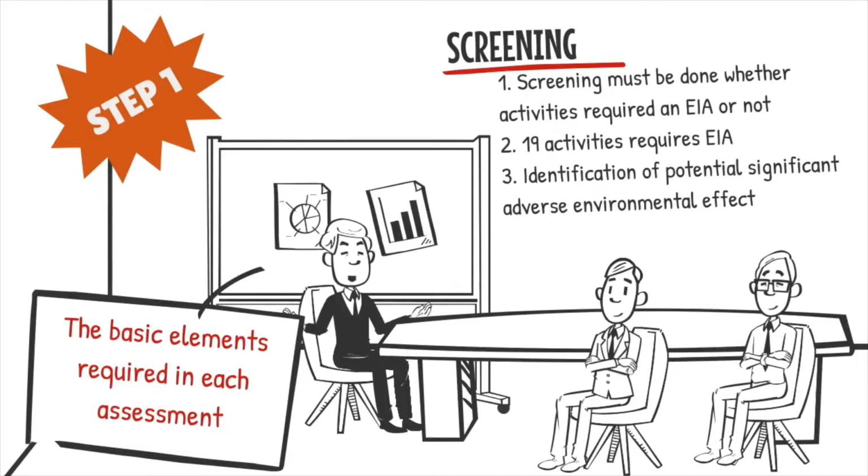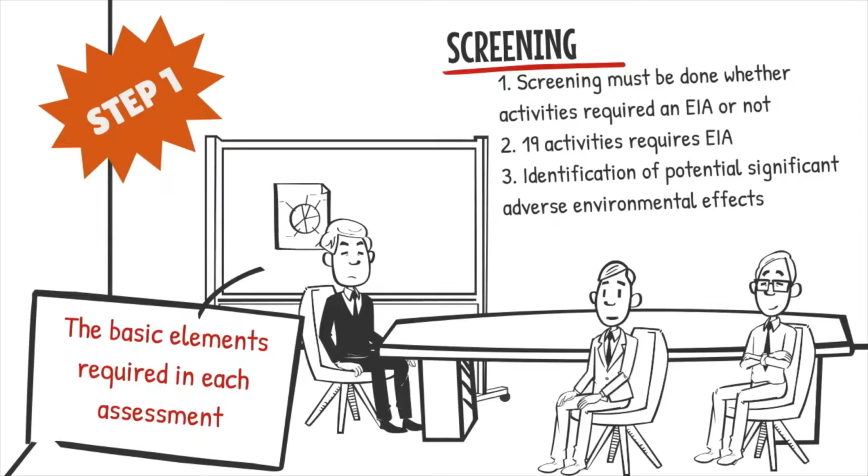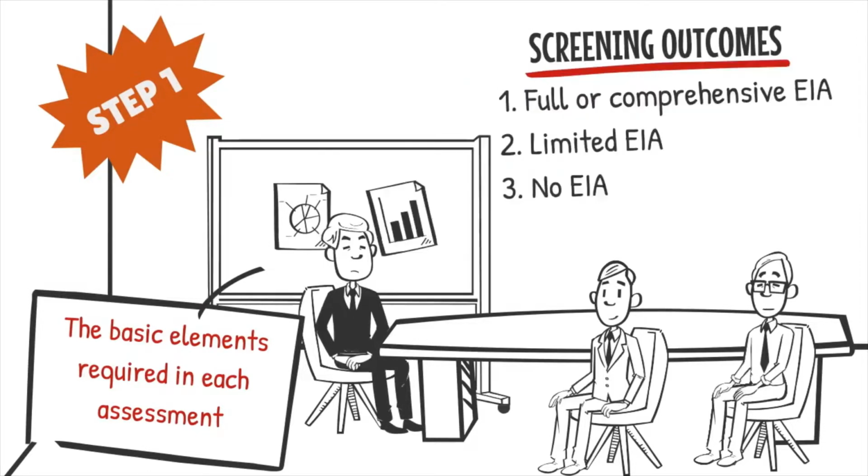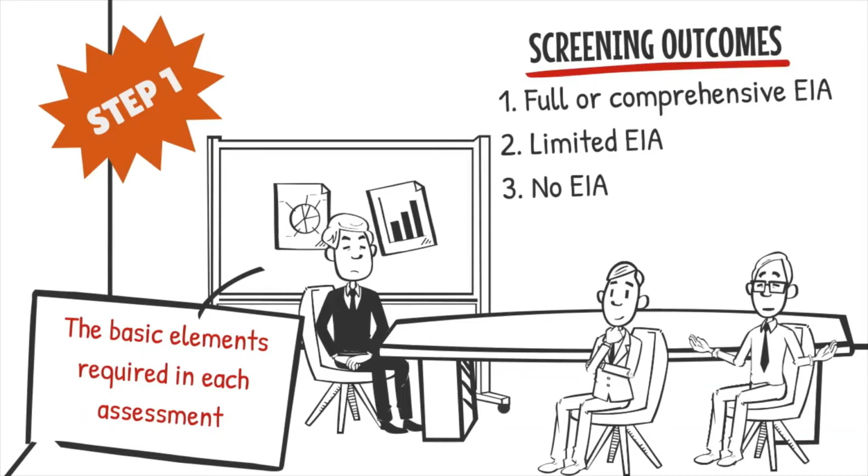So far, there are 19 activities that require environmental impact assessment. Screening is important for identification of potential significant adverse environmental effects. Usually, this step is carried out secondly after the initial activities, because it requires expert opinion. However, for cost saving and budget purposes, this step can be done with available experts in-house. For the screening outcomes, a particular project either requires a full or comprehensive environmental impact assessment, a limited environmental impact assessment, or does not require environmental impact assessment at all.